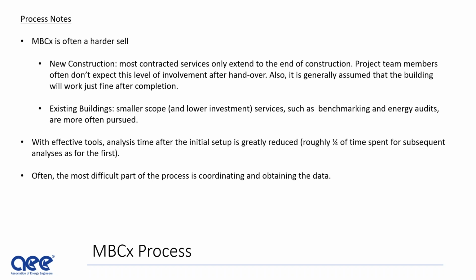But sometimes a first pass energy audit would reveal that, and oftentimes you want to address those big replacement items or fixes before you dive into the further nuance of operation. And that's just the nature of that.